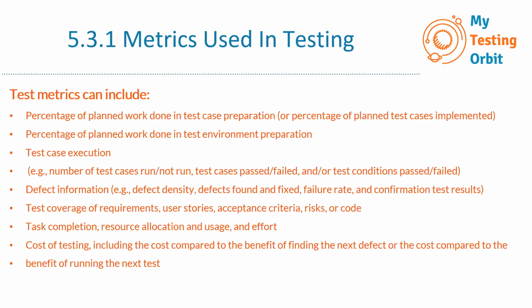Let's say we have 30 test cases, but the desired result or quality we need, and for meeting the testing objectives, is achieved in 20 test cases. Then we don't need to run the next 10, because that will just increase the cost of testing. So this metric helps us decide how many resources or how much time we need to allocate next time for this kind of project or activity.